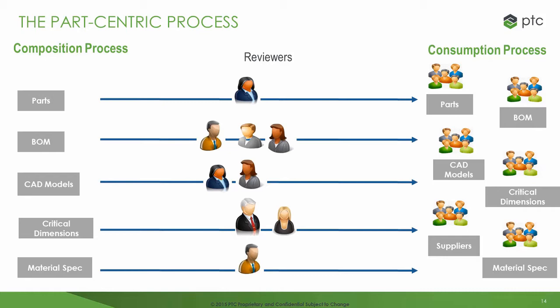available. In fact, there's tremendous value in pre-releasing an early bill of material that may just identify the long lead time items so that purchasing can begin their planning process with an understanding that the rest of the bill of material is preliminary. This parallel process allows for greater agility while removing bottlenecks and ultimately faster time to market with fewer errors.